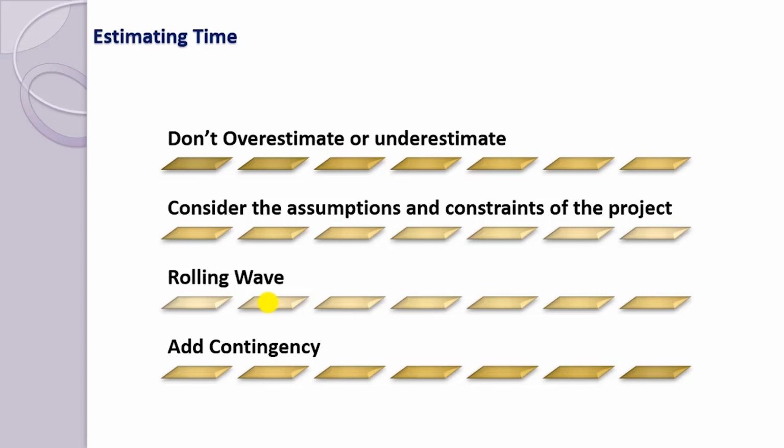So all these things come up, so it's very important to consider these factors that affect the estimation. Instead of planning the entire project in one go, you can use a rolling wave approach that gives a very rough, broad-based estimate for any deliverable. So many a time project managers use this approach.